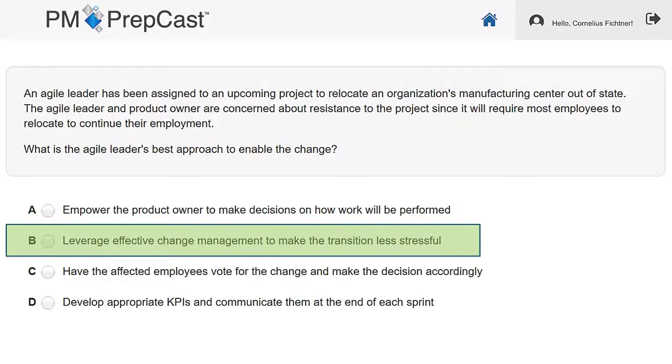Yes. And one thing to also point out at this moment here is change management is fundamentally different from change control, right? Change control is a process where modifications to identified project artifacts must be approved before implementation, whereas change management enables change to achieve the project's desired benefits, right?